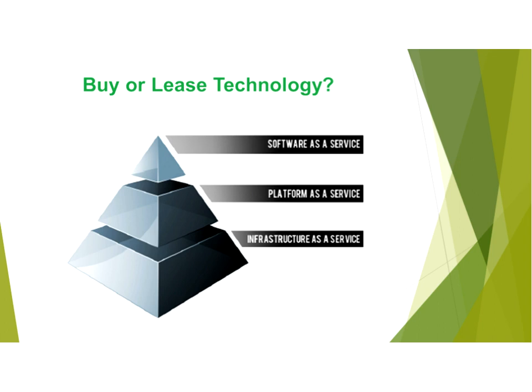It should include two necessary provisions, in my view. The first one is a little difficult to achieve depending on the vendor. The customer must own the data. And the reason for that is the second provision: the data must be transferable should you procure a new software as a service vendor in the future. Your client data especially should be owned. That way, when they respond to your RFP, they can indicate at the end of the RFP how a transfer would take place.